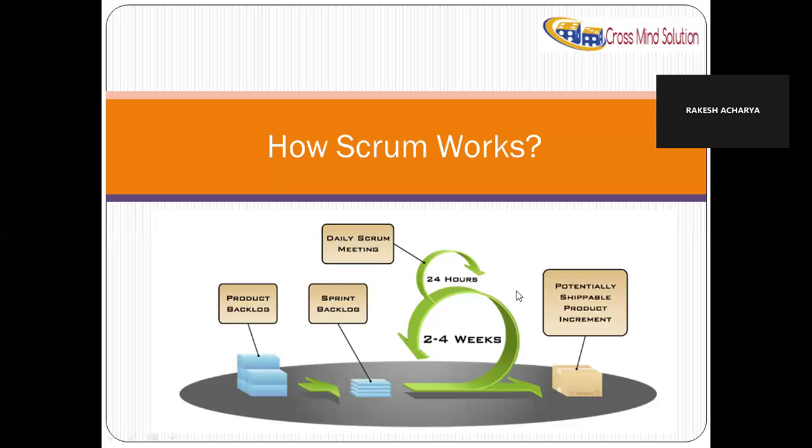in a project. If you say, okay, my sprint cycle will be 2 weeks, then until your entire delivery, you will not change the cycle. You will always keep 2 weeks. If you select 3 weeks, then you will say, okay, for the entire project delivery, I will take a 3 week sprint cycle. 3 weeks means we are not counting the weekend. We are counting only the working days, Monday to Friday. 5 days, 5 days, 5 days for the 3 weeks means 15 days, whatever the items that you are going to deliver. Okay, what are the features that you are going to deliver?